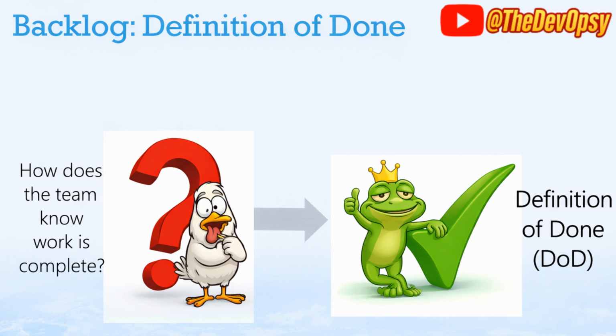As a team, you need to sit with each other and decide a definition of done. For example, and I'm giving you technical details, so I'm not sure how relatable it will be: whether you merged your branch to the master branch, or whether it is a QA branch, did you do that first step? Did you test it for a few scenarios? Did you write the documentation? Did you add unit test cases? All these things can be created by the team and put as a list.